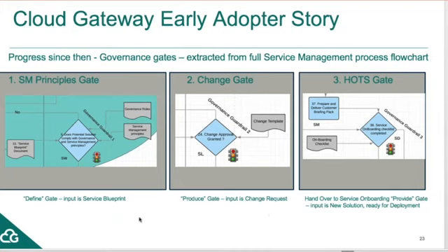So very early on, point 9 in my service management model is where myself and my service delivery manager sit with our developers, our DevOps and NetOps people, and the input, obviously VeriSM calls it a service blueprint, so I've called it that on the diagram. They might call it a design document, an HLDD, I don't mind. It's just us saying, look, let's have a look at the document and let's simply check that this conforms with the principles we all agreed on and we established. Now, we can't decide whether to call that governance gate 1 or guardrail 1 to be completely VeriSM, but we'll see how that goes.